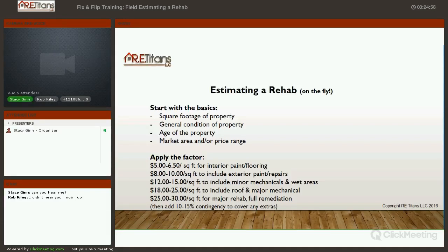Before I move off the factors and especially talk about the $25 to $30 range, going back, this is City of Houston, but for comparative purposes, and when you look at whether it's worth rehabbing a house and the value that you can get out of that on the comps versus building new, excluding your dirt, meaning excluding the cost of your lot or anything like that, new construction in Houston will run you anywhere from $60 to $80 a foot for just say basic houses.